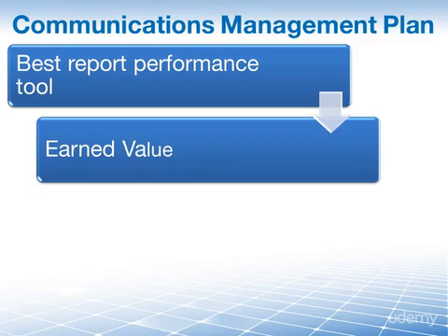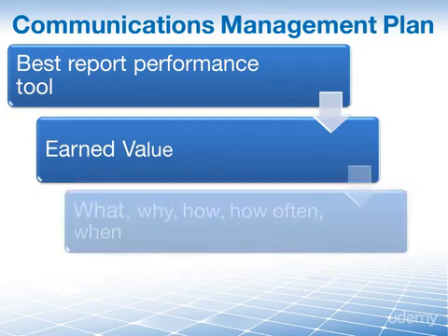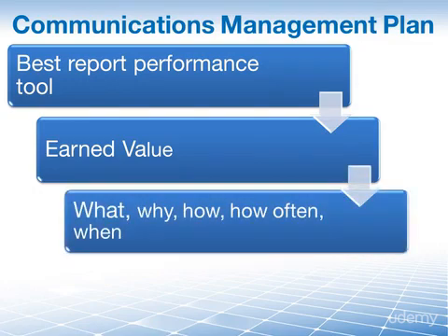Okay, so let's go back to the plan. Let's take a look inside, very high level here. What do we find in the communications management plan? Well, it's pretty straightforward. We find the what, the why, the how often, and when. What do we have to communicate? Why do we communicate it? Usually because the stakeholder asked for it.